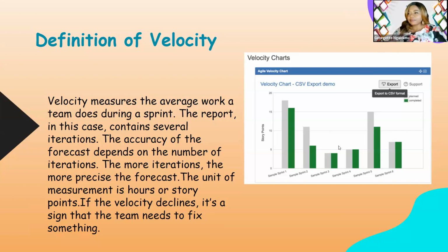Now, what do you need the velocity for? The main goal of having this velocity is to give you the ability to forecast for the next work. It doesn't give you every data point to rate your team in terms of competency, but it gives you enough information to be able to plan ahead, to forecast for the coming iteration. That is the only goal that the velocity has you reach.